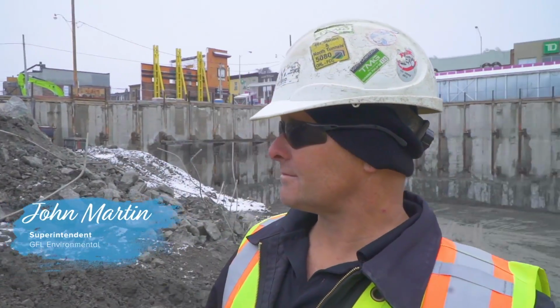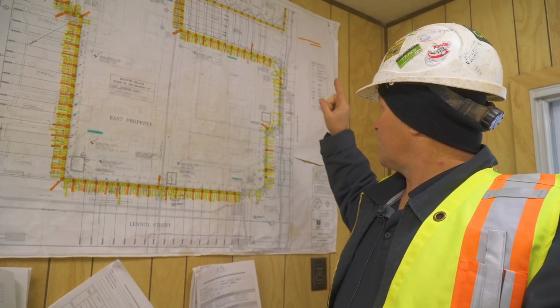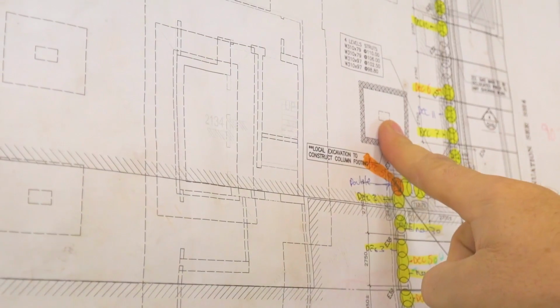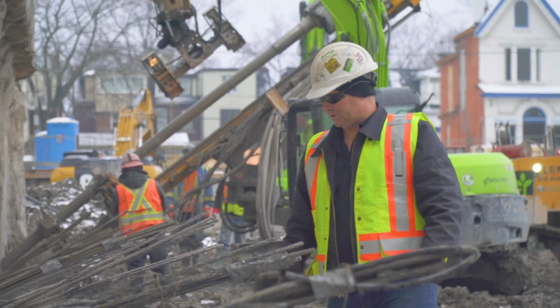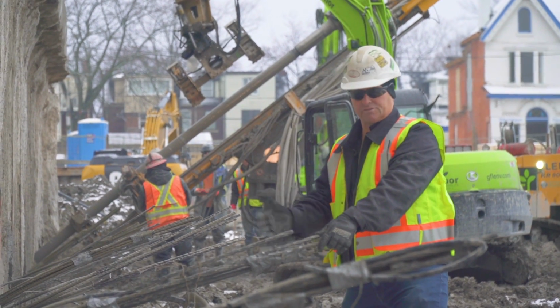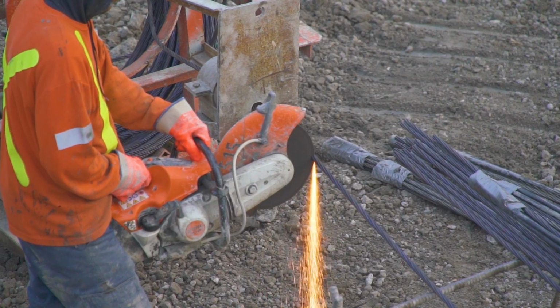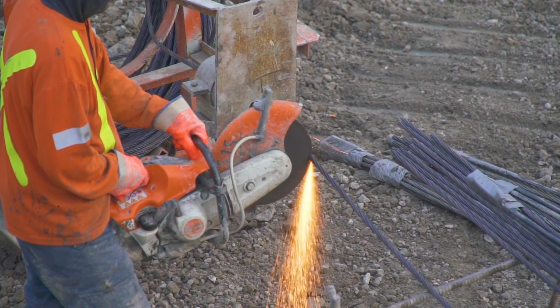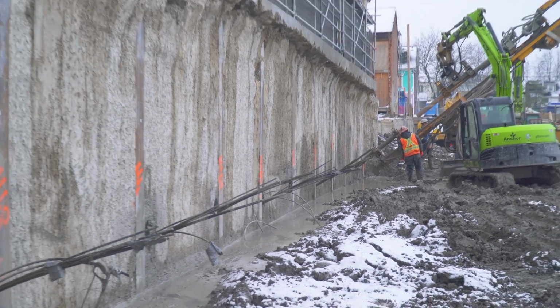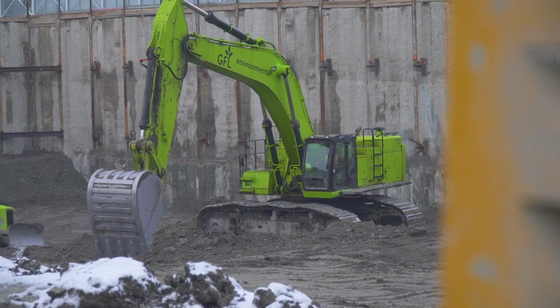We're about 80% complete. We're drilling 34 meters on the shoring and currently working on the east side of the property right now. Okay, here's a tieback that we just drilled yesterday. It's been post-grouted. We're getting ready for the welders to install. We'll have to clean the platform, at which point they'll come over, install the chair, and in approximately 7 more days, that will allow us to stress this tieback and hold the pile back once the stress is complete.